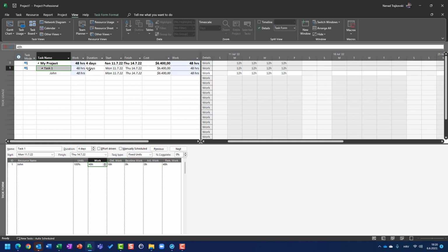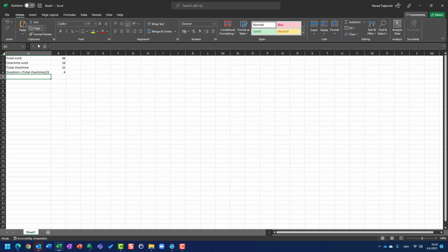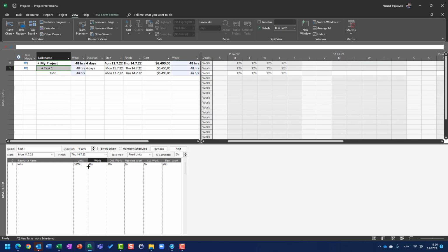Total work is 48 hours, overtime work is 16 hours. Total minus overtime work is 32 hours. And now duration is calculated as total minus overtime divided by 8 hours per day. So 32 divided by 8 is 4 days. Here it is. Okay, you want another example? Okay, I will give it to you.